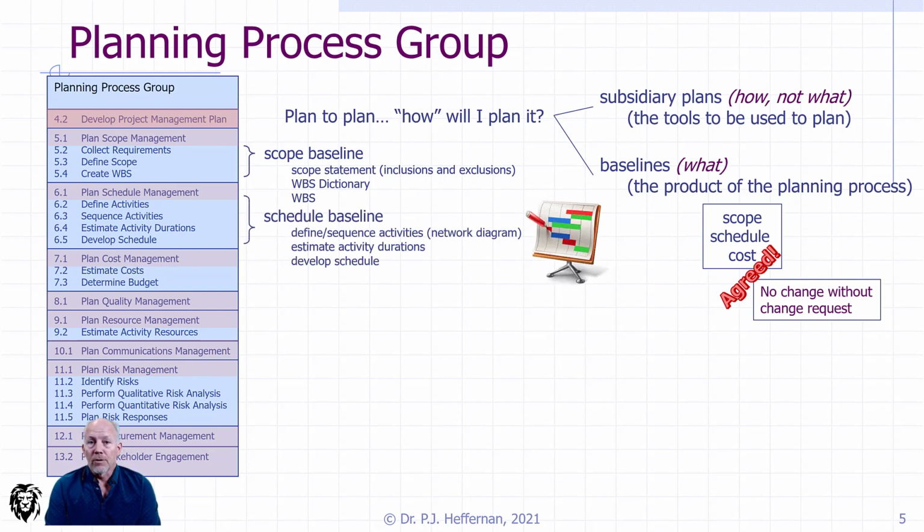Then we have the schedule baseline. So this is, for me, a lot of fun as a construction person. Spending time delivering the schedule baseline can be a great deal of fun. And so this is where we're going to define and sequence our activities. So where do we get those activities? Of course, the activities are coming from the work breakdown structure. So there we feed from one into the next.